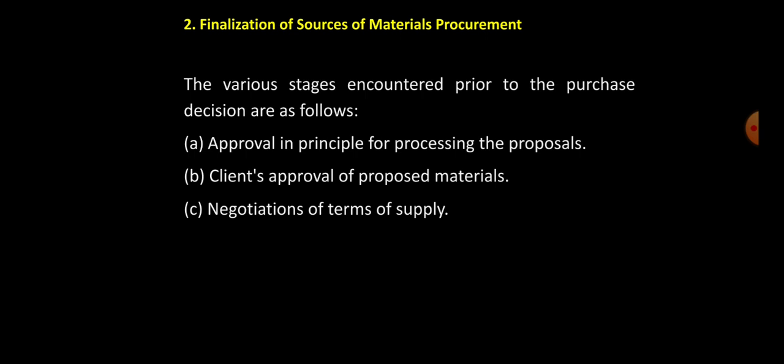In this phase, it is decided that the necessity to take up future changes or improvements in offers needs to be approved in principle by the project management team prior to commencing further negotiations with the supplier, and this is done at the first stage itself. This proposal in principle strengthens the company's representatives engaged in future negotiations and avoids situations which may ultimately affect the reputation and credibility of the company.